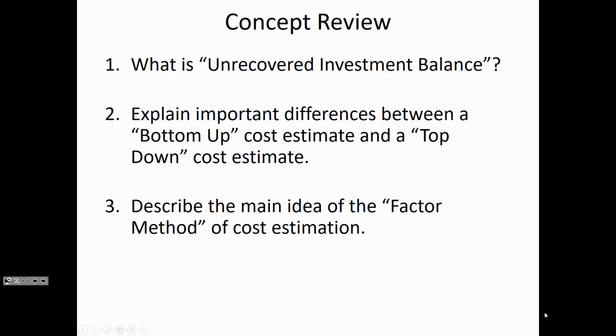So the factor method is the idea that you can predict the entire item or the entire project based on knowing some key indicators. So if you know that for a building like this, the foundation is usually about 30% of the finished cost of the building, and you just had someone give you a quote of a $1 million foundation, then that would help you to scale up and get a very broad estimate of what the finished product might cost.